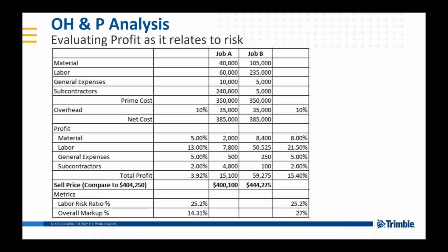So think about also the joining method in which you're going to be joining this stuff together. Some of the plastics that we're using today are wildly affected by temperature. If you're using something that takes a hot plate, like butt fusion or a socket fusion type process, and it's very cold, it's not going to go as well as on a warm day, obviously. So I would certainly be thinking about those things, or if you're using PEX or whatever, you may want to consider it differently if it's a very, very cold situation. So there are some factors off the top of my head that I might suggest.